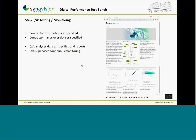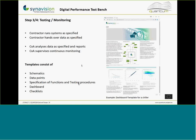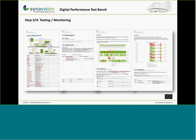Whether it's a KPI, a system temperature, an air flow rate, or whatever you specified — this shows the power of ICT tools. Because this is done in software, you can create templates and don't have to start from scratch for every building. We now have a library for boilers, chillers, heating circuits, air handling units, and indoor environmental qualities — all predefined — which massively accelerates the whole technical monitoring process. For example, this air handling unit shows data points, temperatures, and characteristics, giving a very detailed analysis of when the system was running correctly and when it was not.